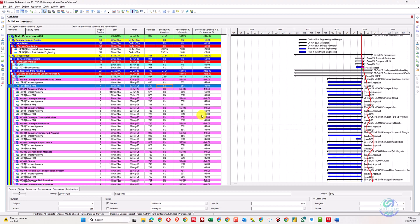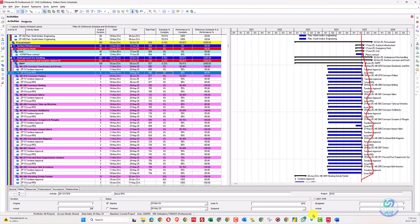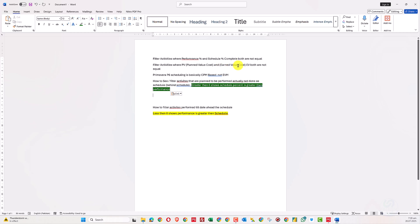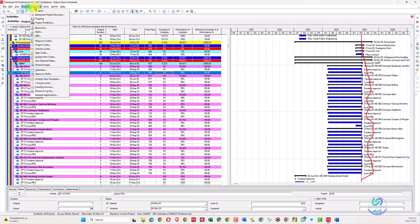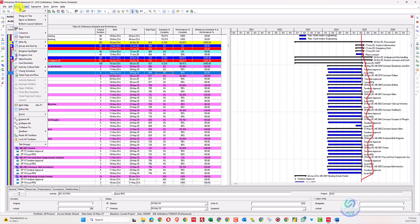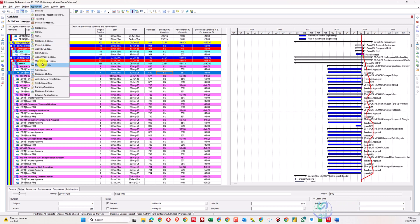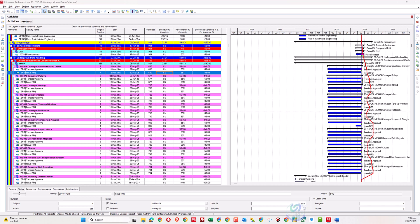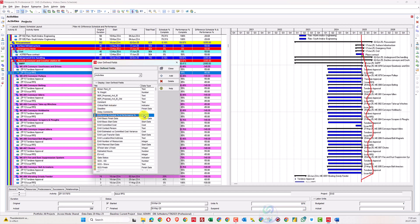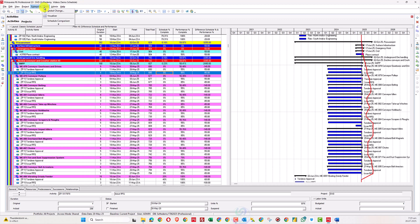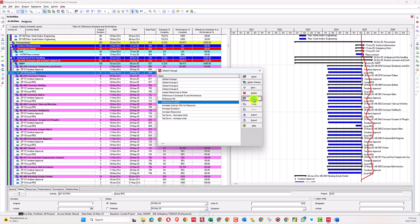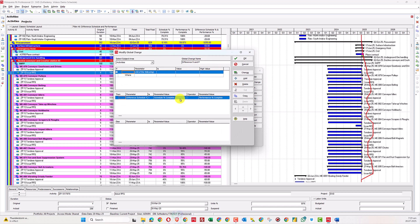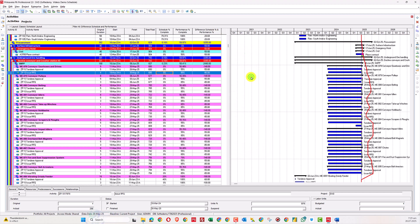For the last question about planned value (PV) and earned value (EV) cost difference, similarly go to the user-defined field column and add a number column named 'Difference in PV and EV.' Then go to Global Change and write the formula: Planned Value Cost minus Earned Value Cost. Add that column to your layout and create the same type of filter.